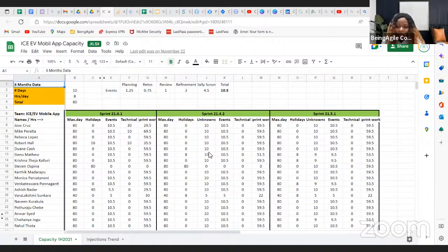So capacity planning would be you all coming together, evaluating, okay, given that each person has 8 hours in a day to offer. In a sprint, if you're doing 2-week sprints, it means that each person should be given 80 hours per sprint, for that entire 10 business days of the sprint. And if you're 10 in a team, that will be 80 times 10.